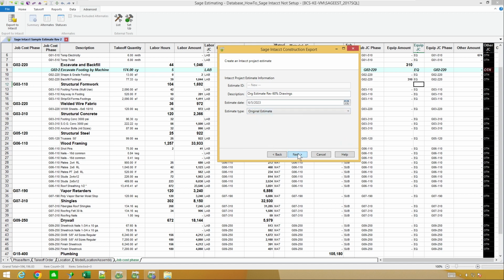And as you've seen there, you did have some options of, I want this to be my current estimate and take over, or this is where I'm going to do some forecasting with estimate budgets and so forth. So a few different things than what we've had before to do some other comparison of these different numbers together. And in my case, I'm going to tell it I want to allocate add-ons because I've got sales tax that I want to allocate. I'm not going to look at a report in this case.